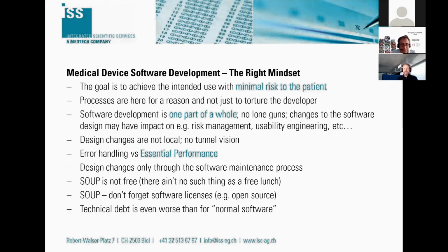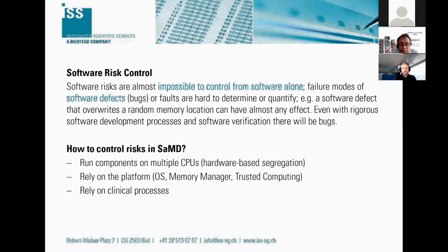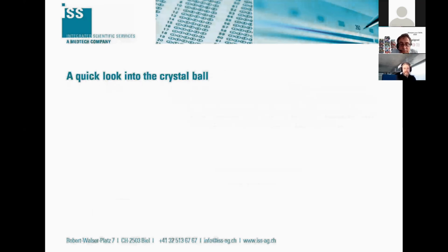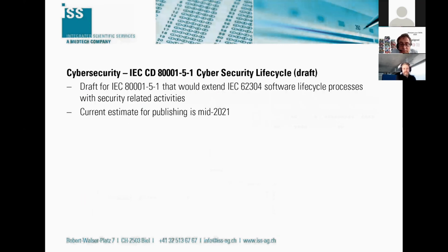And in that regard, that's about refactoring. Technical debt is if you create a shortcut, plan to fix it later in a subsequent release. With medical software, this means you have to do a lot more testing, because if you refactor later, you touch a lot of parts of the software you wouldn't need to touch for just minor changes. So if you need a lot of refactoring, you will do a lot of work and a lot of testing. So these are essential things that are usually asked questions. Quick look into the crystal ball.